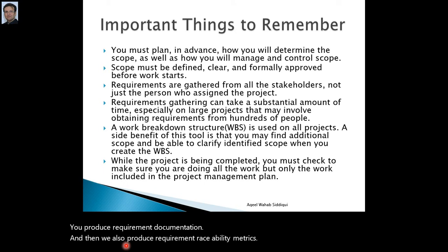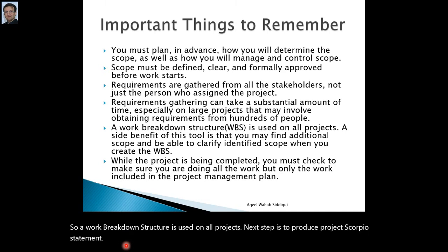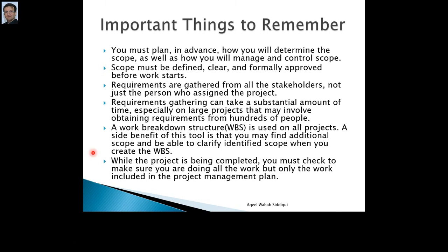Next step is to produce project scope statement. So right after producing requirement documentation, requirement traceability matrix, and scope statement, we produce a work breakdown structure.